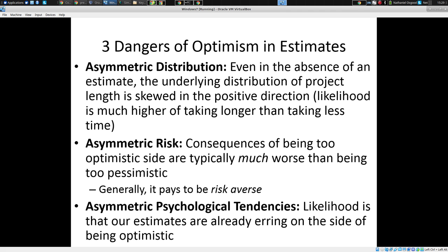And suppose you're three months late. Your system's not even delivered until the beginning of March. They are screwed because they structured their whole workflow around using your system, and it's not in place, and they're trying to use the old system, but they weren't counting on using it, and therefore they haven't really updated it accordingly. And people are building their assumptions, their cutover plans, their workflow around something which they are bitterly disappointed about when they get the system. If you tend to say too late, there is a risk. It's not zero. As Mason said, there's a risk here.